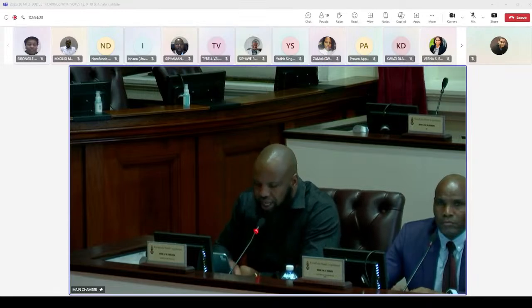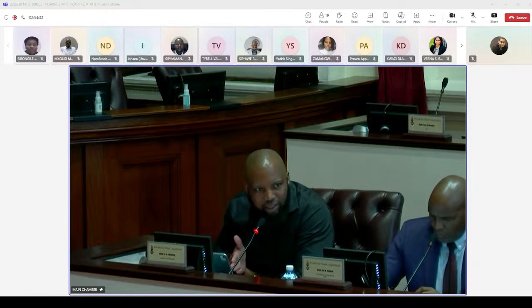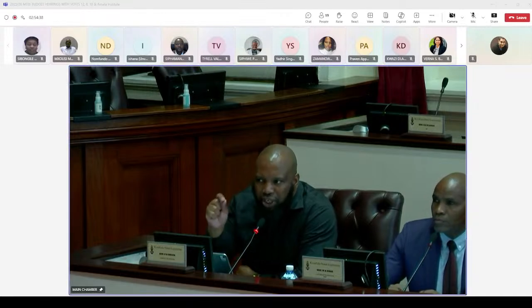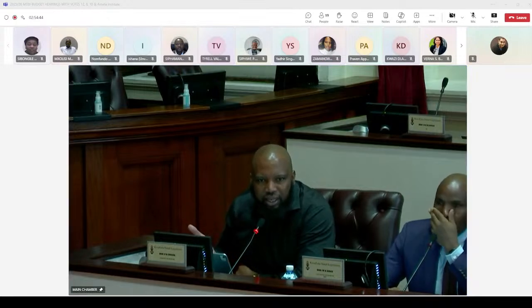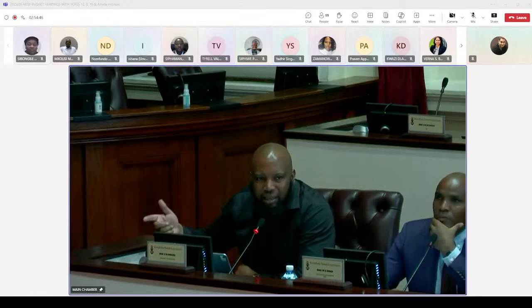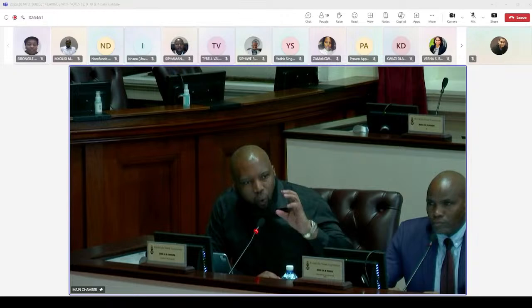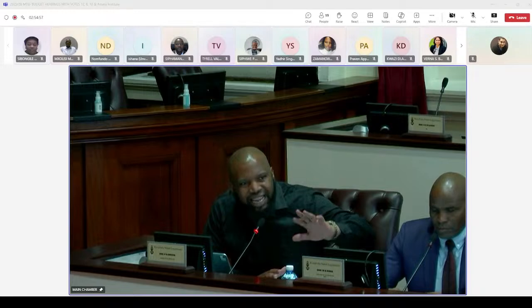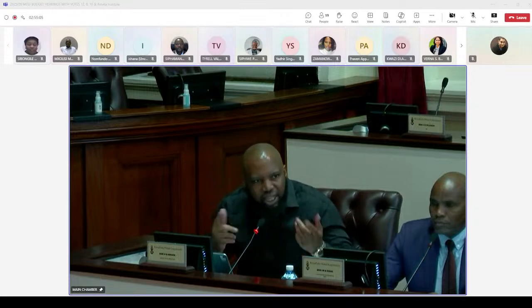So I thought, Chair, it is always critical that I give this background as to why the department currently has even less than what we used to have on the projections. We will even tell the implementing agent that, with what we have in our coffers now, we can only afford for you to build at least 20 units a month. Otherwise, we are not going to give you the payment. Those are the realities.